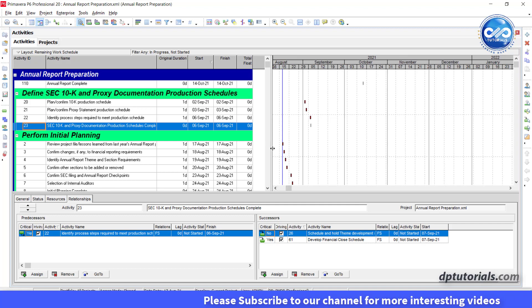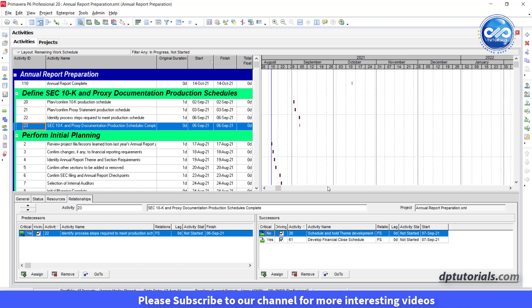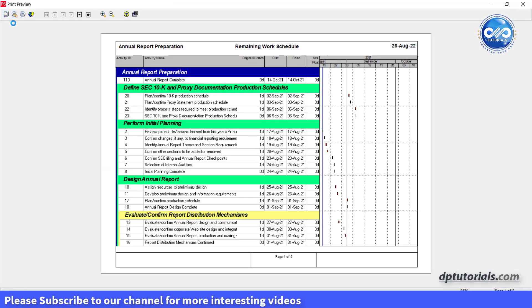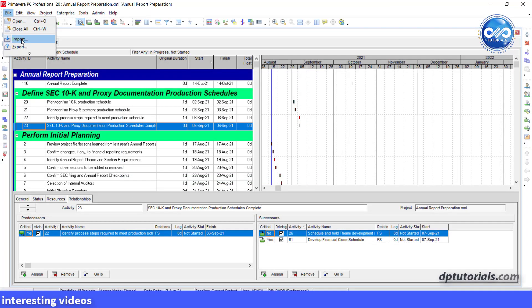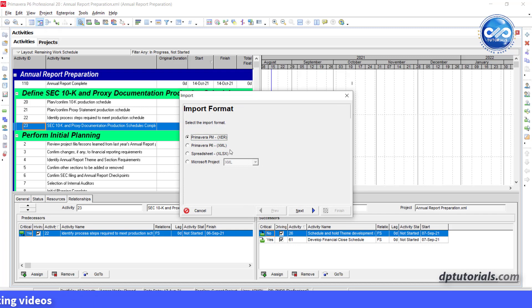Now if you want to import the schedule along with the defined layouts, go to file, click on import. In the import format, select the xml format.